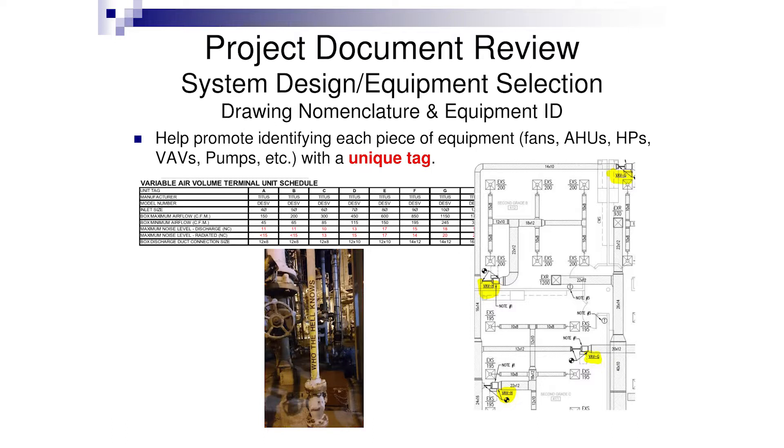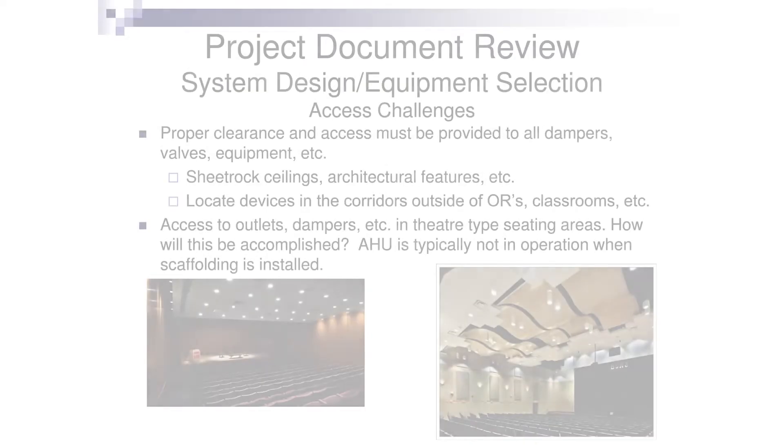If we can promote in our industry that engineers build a good schedule — with maximum air flows scheduled correctly, GPMs and reheat coils sized properly — you develop a good system through the whole process. When the owner takes occupancy, everybody's calling the VAV the same thing so the maintenance staff knows what they're working with. One engineer simplified it nicely: VAV-1 is off air handler 1, dash whatever number. If it's VAV-2, you already know you're on air handler 2. Great little systems that help when building the job and when the owner is using and occupying it.